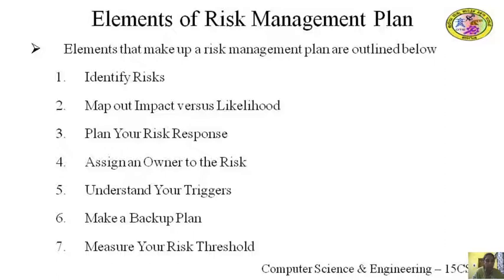This will give you an idea of how likely the risk is to impact the success of the project, as well as how urgent the response will need to be. To make it efficient for all team members and stakeholders to understand the matrix, assign an overall risk score or rank by multiplying your impact level score with your risk probability score. You can get started with your free risk assessment template.